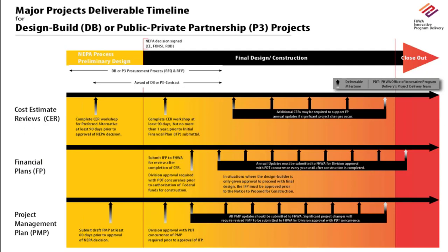And these financial plans are updated on an annual basis as the project progresses through construction. Our project management plan is required 60 days prior to approval of a NEPA decision. And the division also would look for updates when there are major changes in the project scope.